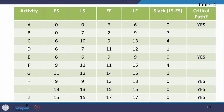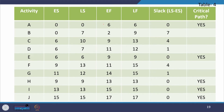So far, we have found the expected total completion time. Now, we consider variability in the project completion time apart from the mean. The critical path A, E, H, I, J resulted in an expected total project completion time of 17 weeks. But we must also supply the variance — we have to sum the variance of all activities in the critical path.